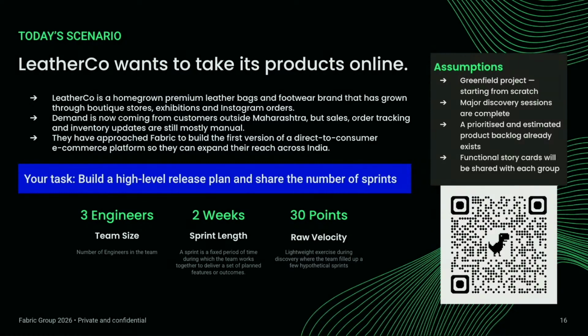And you've also parallelized. Like search filter and shopping cart can go on in parallel. Was that the thought process? Yep. Okay, that's really good. Search filter is kind of dependent on product catalog. If you don't have a product catalog, you can't really search, so that's why you have kept it in a linear manner, but other things are parallel. That's really great.